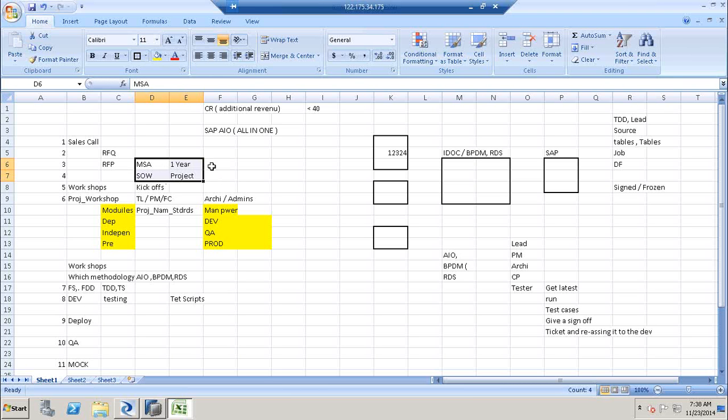We fill them and get them reviewed by our legal team and finance team. So there will be two teams. The finance team checks whether I'm getting the right revenue and whether there are mistakes in the numbers, and the legal team cross-checks and verifies whether there are any legal issues in this document. If we say something bad, the customer might feel offended. So we should not use harsh words like "you are responsible" or "you should be working on." We also cannot say "I might look into this." Words like should, could, would, we should not use in SOWs. These are the basic rules we generally follow when we write statements of work.